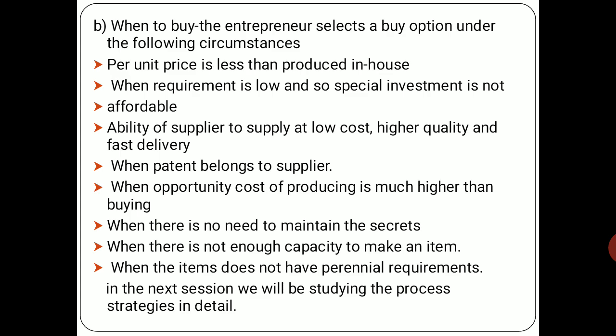Preparing the thing at home may be costly, because we may not have all the specifications or all the equipment required at that time. It's better to get it from outside rather than preparing it in-house, right? When the requirement is low, and things are needed only on an order basis, the demand is not continuous, not perennial, then setting up the process may be longer and a costly affair.